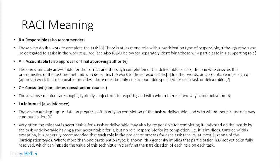Very often, the role that is accountable for a task or deliverable may also be responsible for completing it, as shown in the matrix. Outside of this exception, it is generally recommended that each role in the project or process for each task receive at most just one of the participation types, so that we stop passing the buck. Where more than one participation type is shown, it generally implies that participation has not yet been fully resolved, which can impede the value of this technique in clarifying the participation of each role on each task.